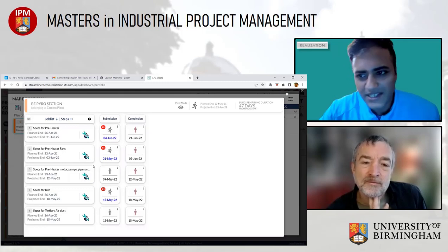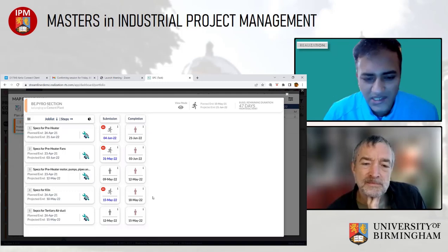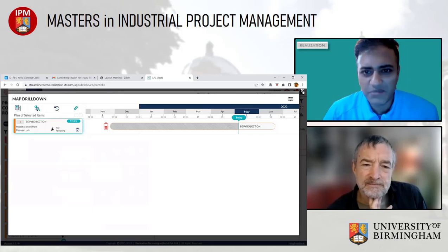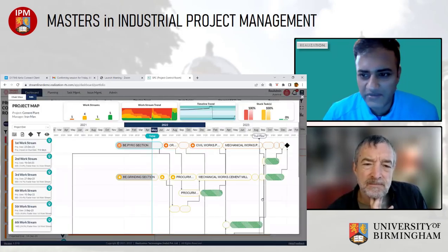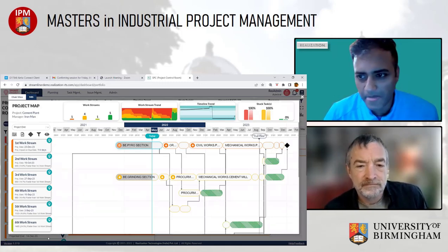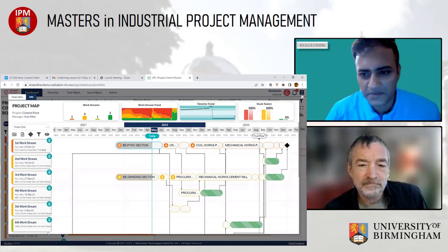But otherwise, this is just taking the daily progress from people, converting them into an impact on the total duration of the project. Then it's putting it back in the task. Then it is putting it back into the network. The network is recalculating, and it's telling you where your priorities lie. So this is the job of the system.